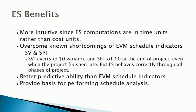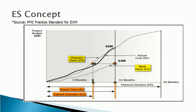Earned Schedule provides the basis for performing schedule analysis. Earned Schedule can be described as the value of the time increment where the earned value at the status date should have been accrued. As seen in this graph, Earned Schedule is determined by projecting earned value at the status date — which is actual time, 8 or 10 months in the graph — onto the Planned Value (PV) curve. The time associated with this projection on the PV curve is the Earned Schedule (ES).